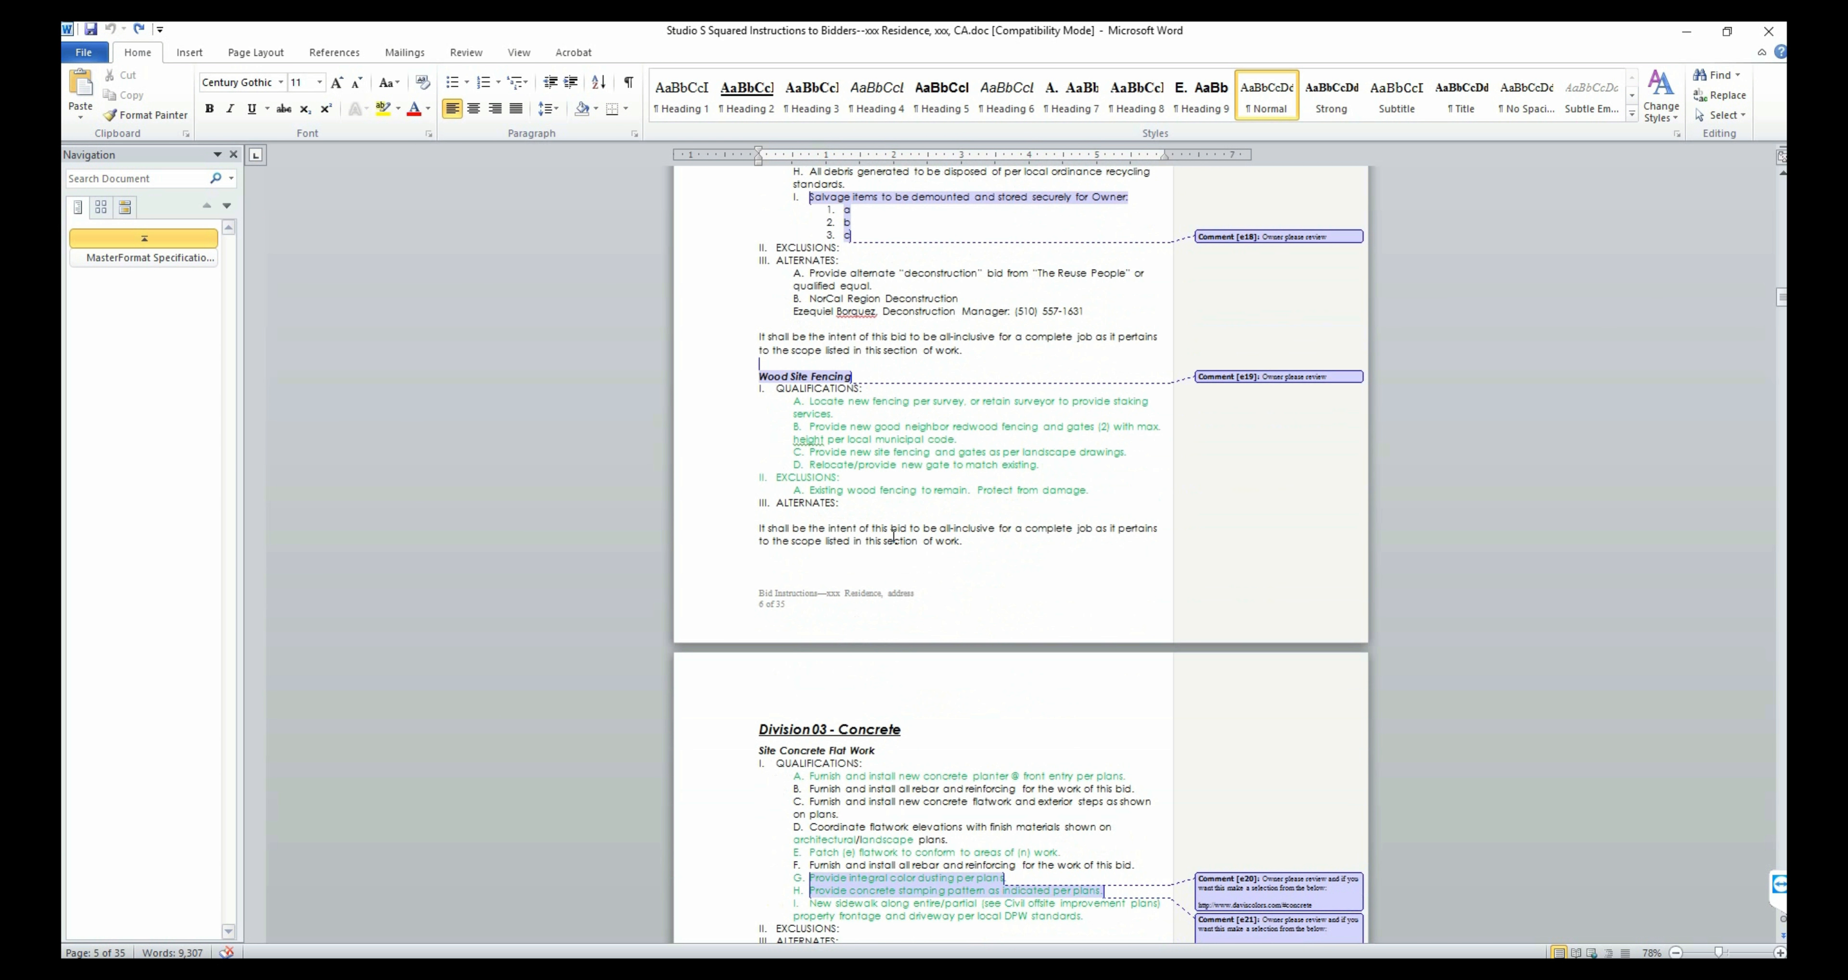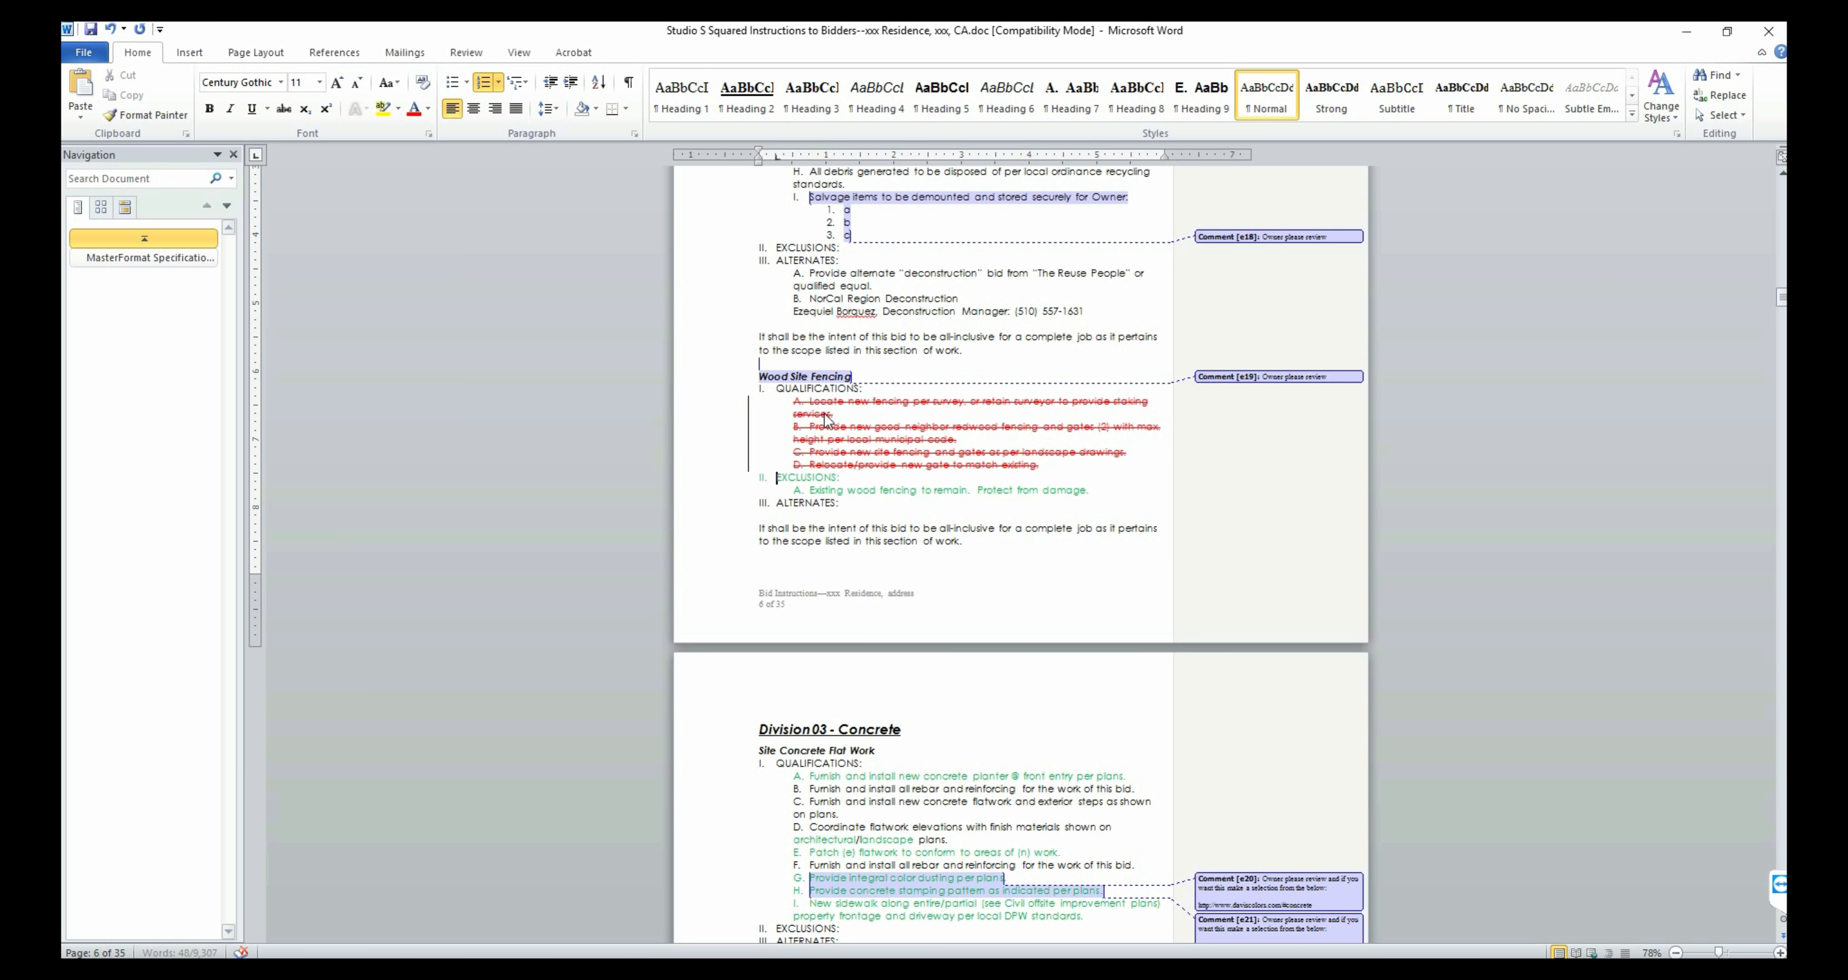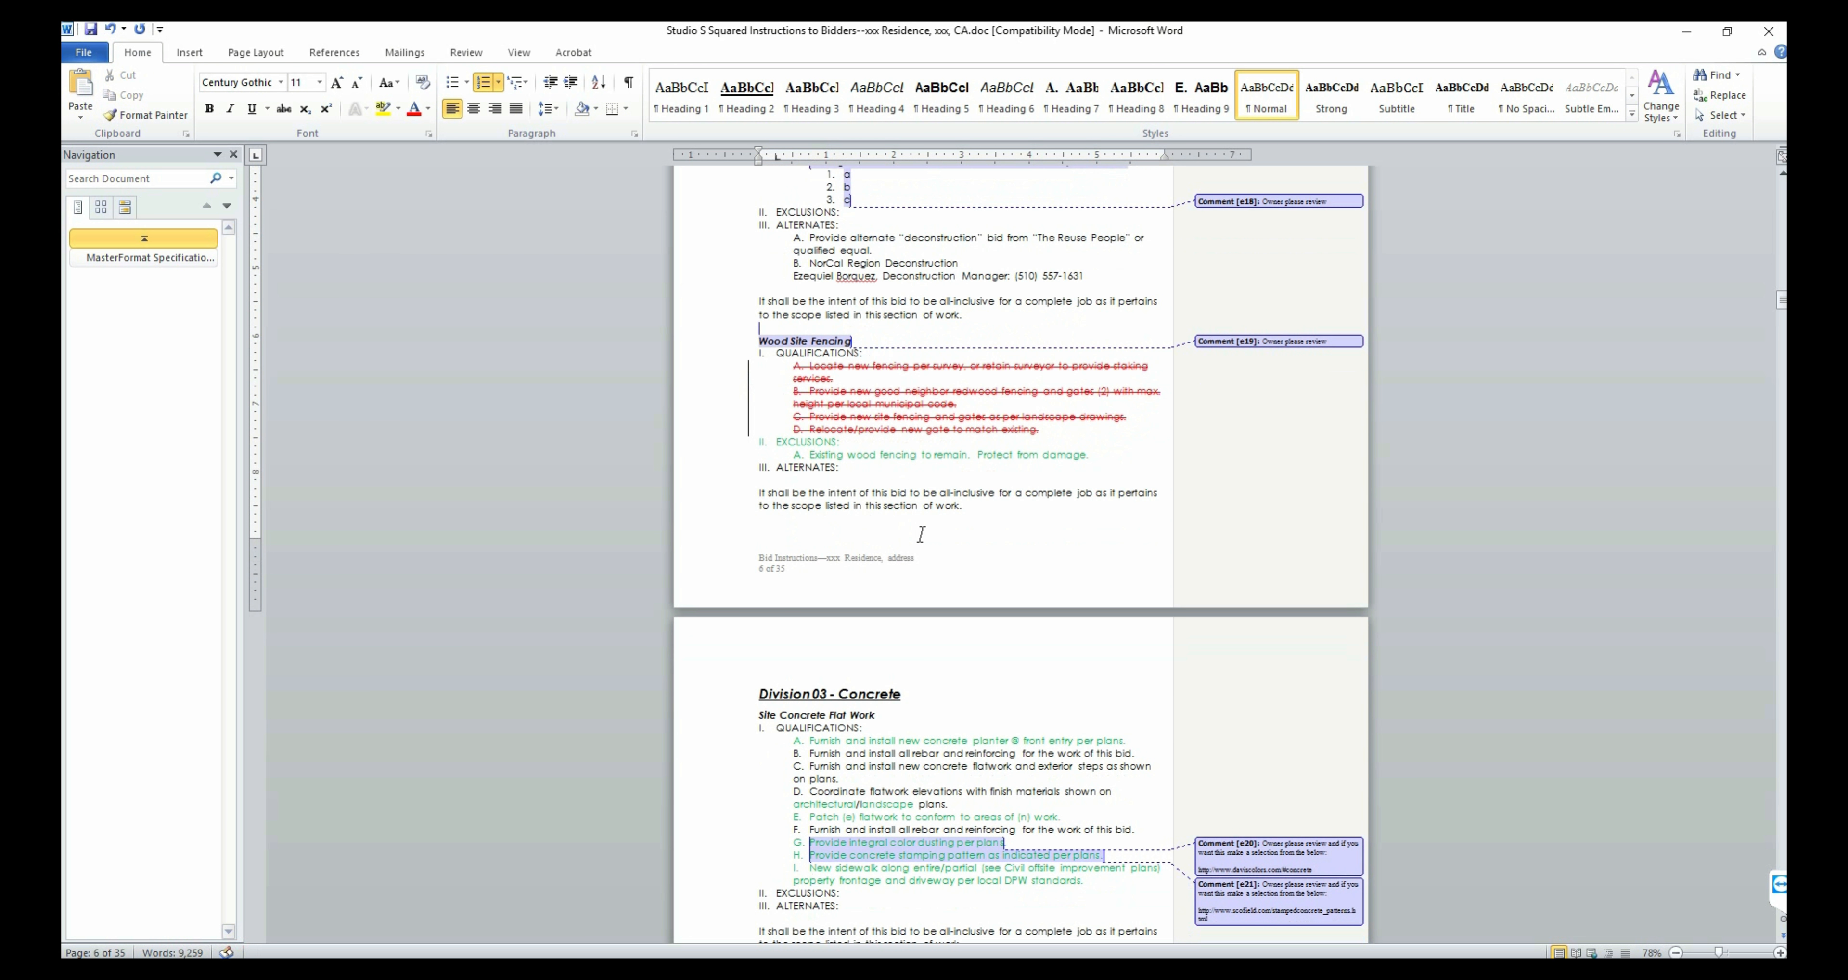in the wood fencing section, if you plan on retaining your existing fence, then you will list it under the exclusions and all the items below the qualifications section can be removed. In other words, qualifications and exclusions are mutually exclusive.